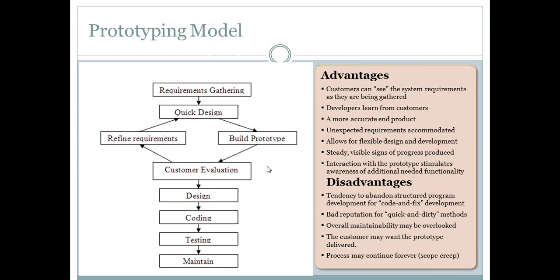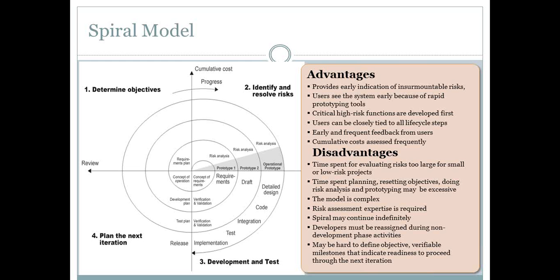Now let's take a scenario wherein you are spending some 100 million for a project, and it's spread over like a 4 year time frame, and you don't really want to wait 4 years and spend $100 million and finally realize that your project is a failure, right? So you actually want to identify what the risks of the project are upfront and see whether you can address them right away, and if they cannot be addressed, you just want to close off or shelve the project, right? So that's basically the way of working of a spiral model.